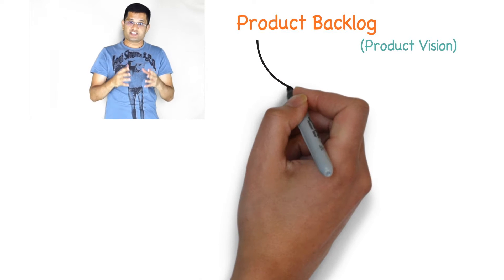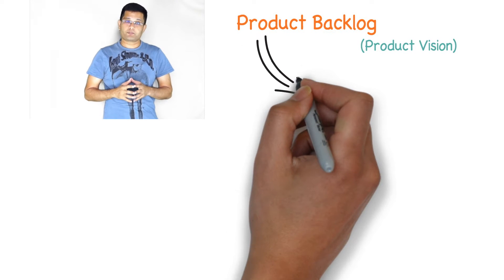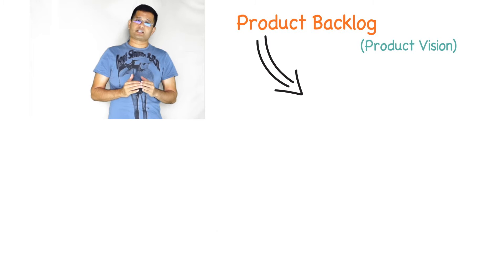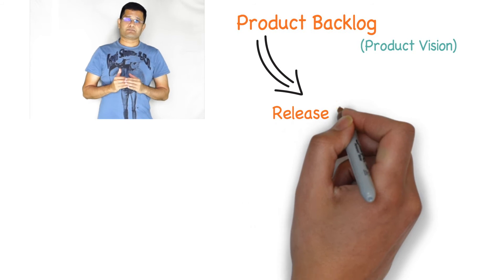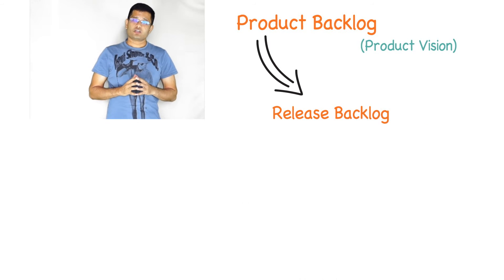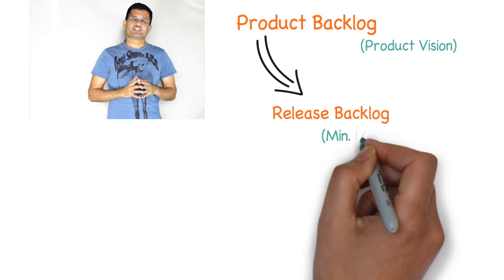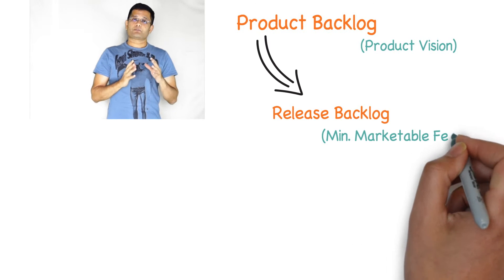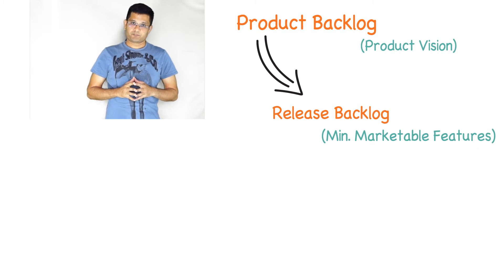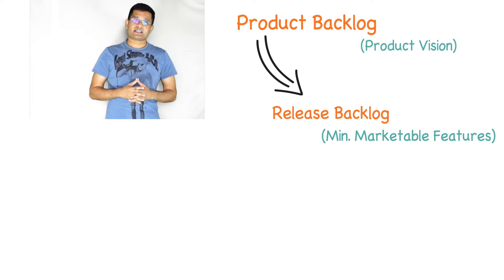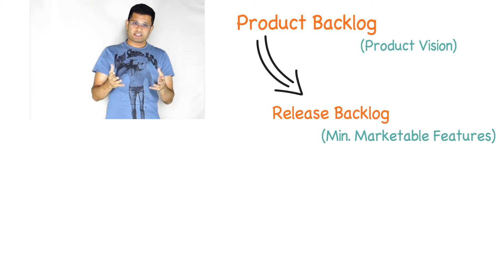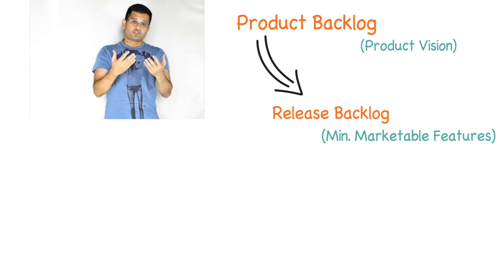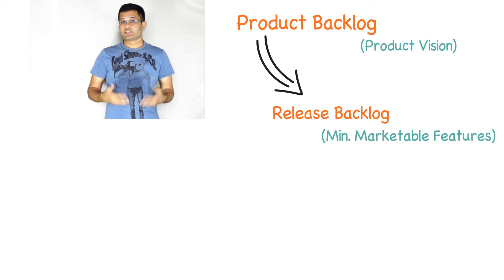A subset of the product backlog is the release backlog. Release backlog looks at the minimum set of features that is required for the product to go to the market. Typically depending on your organization, the release backlog's time span may be from two months, three months, six months, eight months, or to a year.